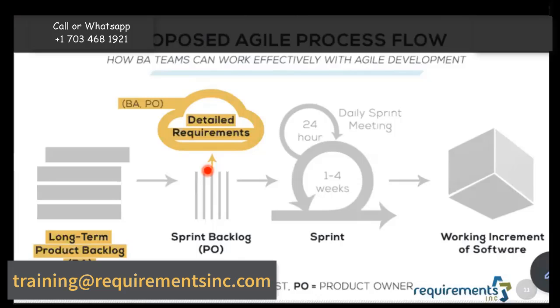That is one way to think about it. But the real Scrum way of looking at it is you will pick up a story that you're very familiar with. Let's say, interacting with the timekeeping system and then pulling that information in here, right? That might be a simple story. So you know that, okay, this is 4 plus 2 plus 6, let's say 12 hours. 12 hours as in 2 days of work, 6 hours plus 6 hours. So for this story, I'm going to call it 2 story points. Makes sense?